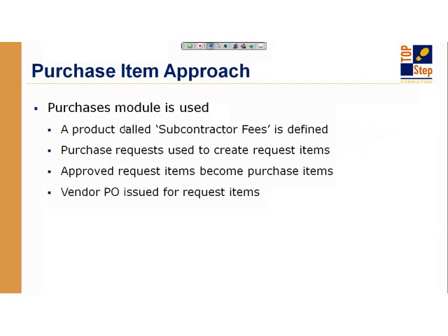So the purchases module actually allows you to do, if you'd like, full procurement processing from within OpenAir. And when I say full procurement processing, I mean somebody is requesting permission to purchase something against a vendor, and that request is then reviewed perhaps by somebody in finance or the procurement office. When they approve that, they issue a vendor purchase order through OpenAir. That vendor purchase order has a quantity and an amount that is approved to spend on a vendor. And as the vendor invoices the company for work performed, you can fulfill that purchase order, and that would incur cost against the project. Okay?